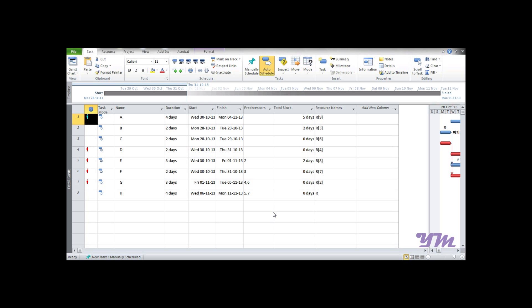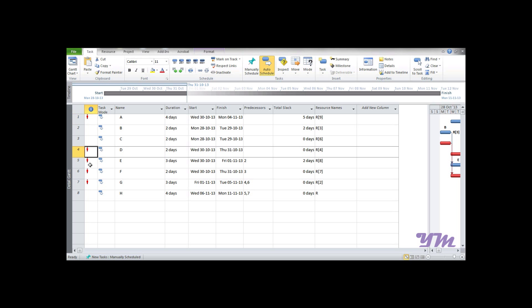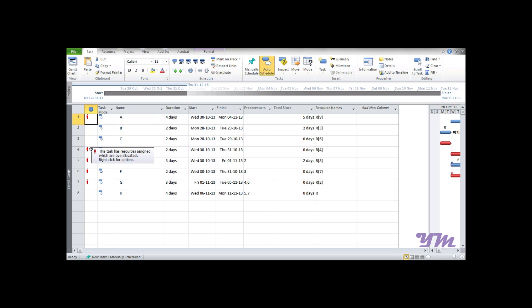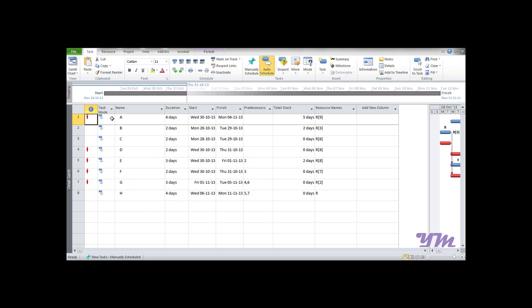Resource leveling in project management is a technique used to examine unbalanced use of resources over time and for resolving over-allocation or conflict of resources. In this file, after you assign resources, you can see small red marked symbols here. This indicates that the resources required for the task are more than we have assigned. How to resolve this? It can be resolved with resource leveling.